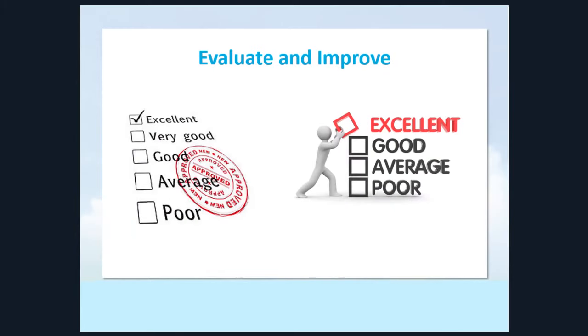So I talked about evaluation and improvement. Too often we think in binary ones and zeros, success and failure. Many plans have many variances of success, much like when you say, it's going to cost me this to build something, but I'm going to budget 120% of that because there are always overruns. So it's the same kind of thing. You want to be able to evaluate and improve.